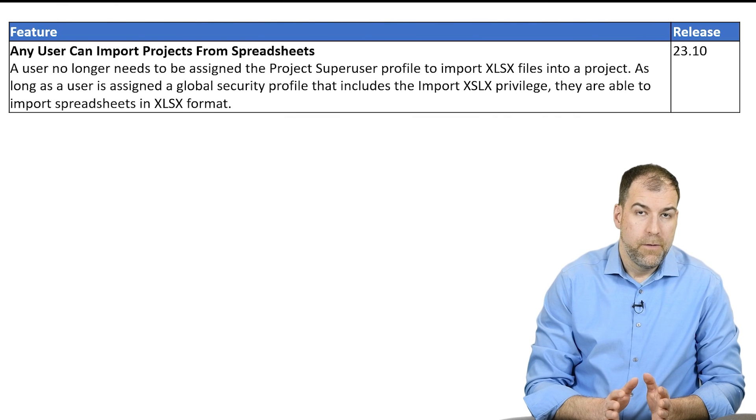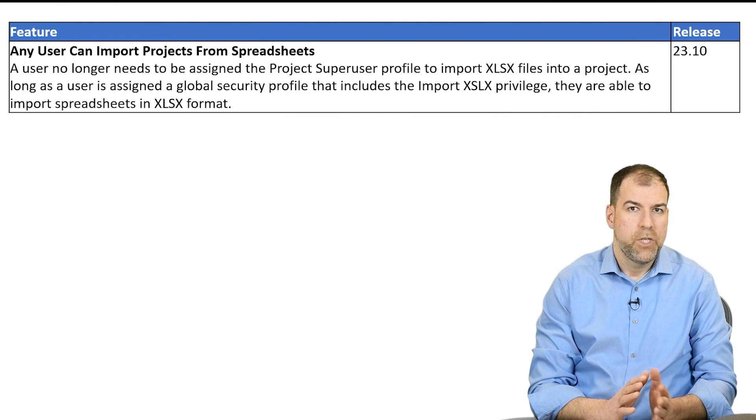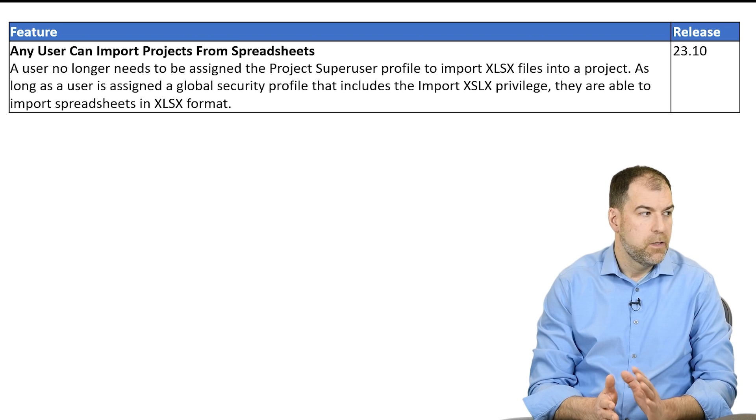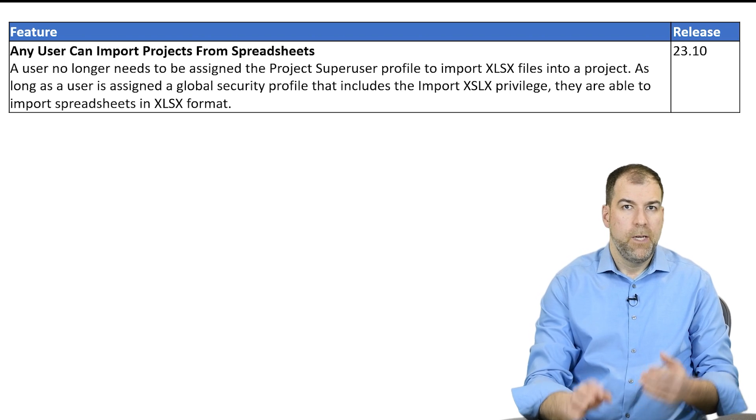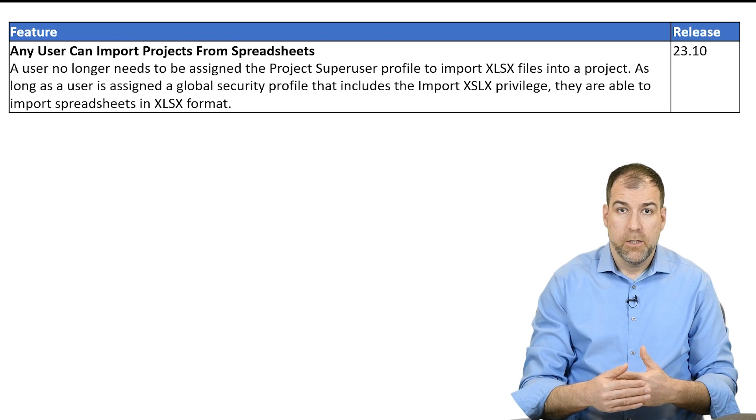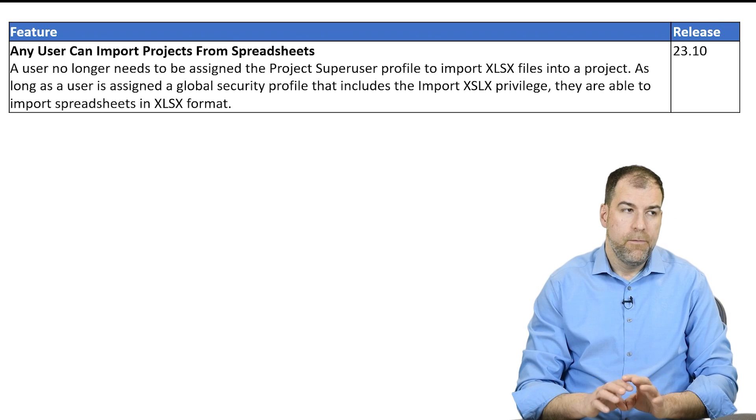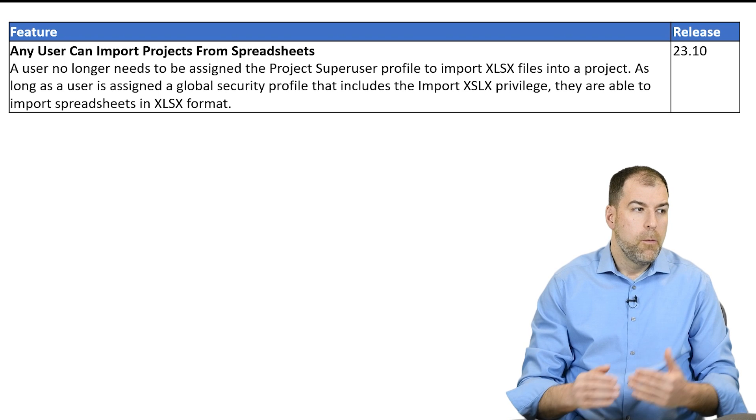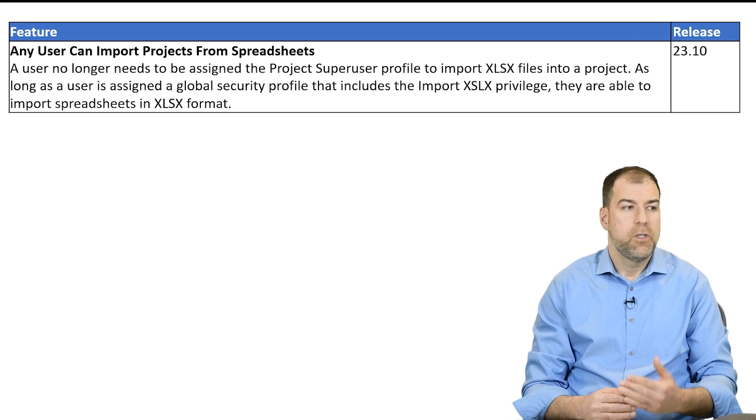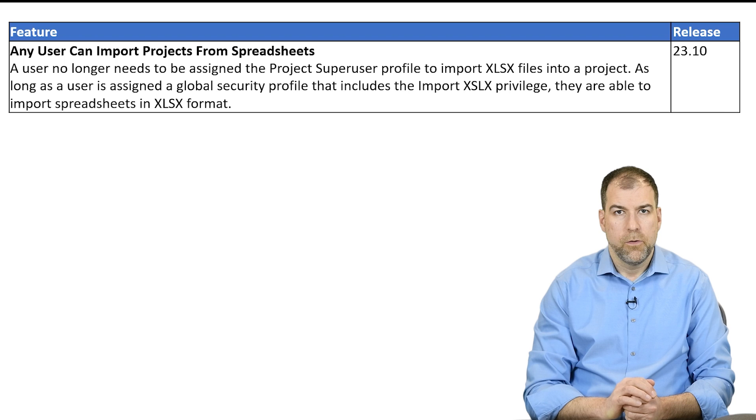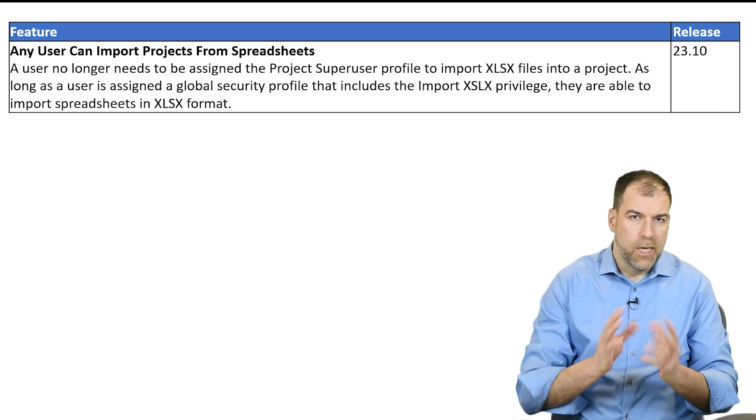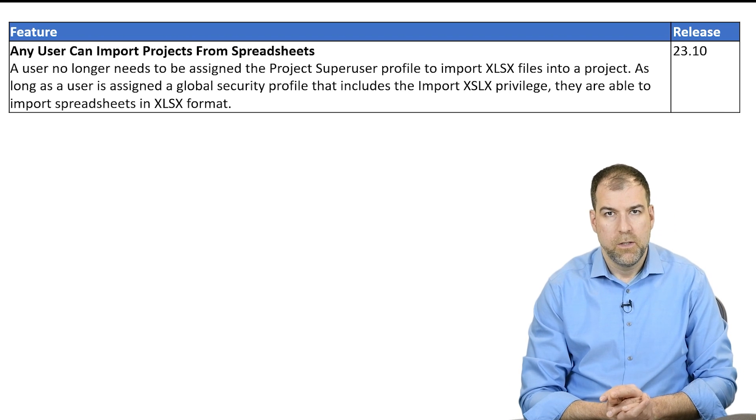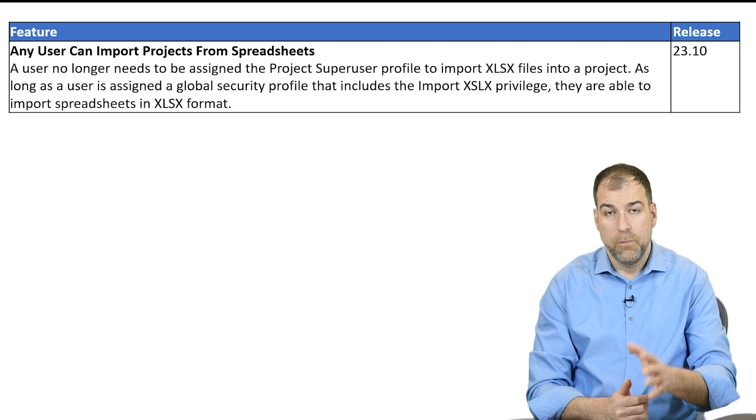Next, this one is really for administrators as well. They're making a small change to some of the permissionings. To be able to import projects from spreadsheets, you needed to be a project super user in P6. That was your permissions. Now they've uncoupled that so you don't need to be a project super user anymore, but they've created a privilege that you can use to allow users to be able to import without being project super users. So again, refining some of the permissionings. Mainly for database administrators, this is going to be important.